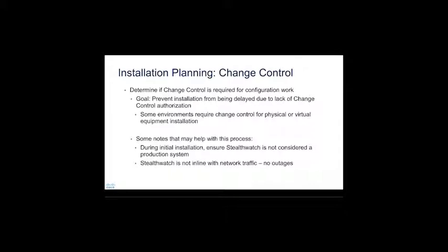Because of all of the steps in the process, and depending on how your customer is architected and how many levels of change control and complexity they have in place, it's going to be critical that you understand what that looks like, so that you don't run into a situation where you have delays that you were not expecting. So we want to make sure that we're getting them the information they need. They know exactly what to cable, how to rack it, how it's powered, where it goes, what talks to what, so that we can get all of that out of the way before you go on site.